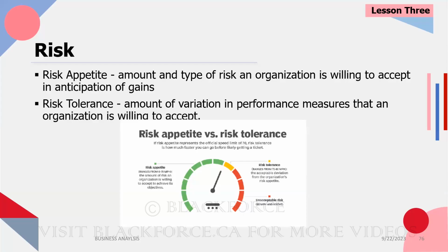It took forever to put this team together. We know there's not many people with the skill set we're looking for, but if one person leaves, we'll be fine. We have multiple developers, multiple BAs. But if two people resign, or let's say if two developers resign, of the three that we have, we have entered a range of unacceptable risk. We have exceeded our risk tolerance.